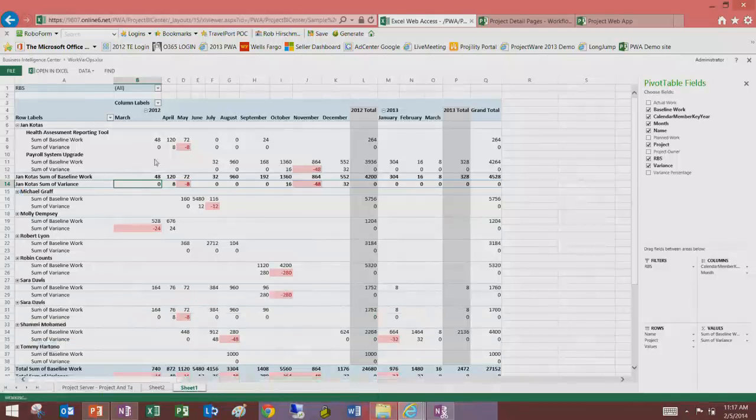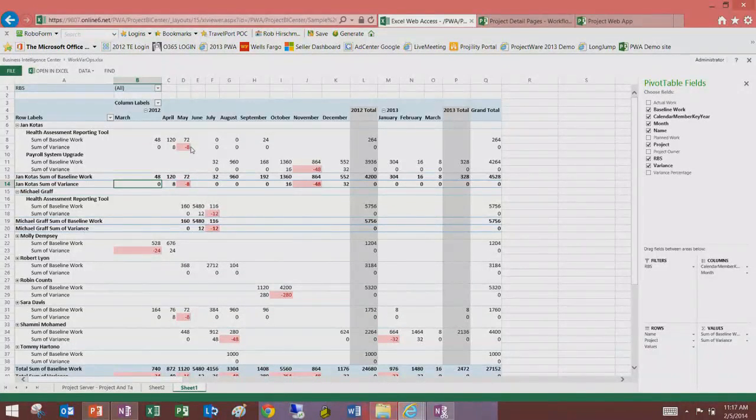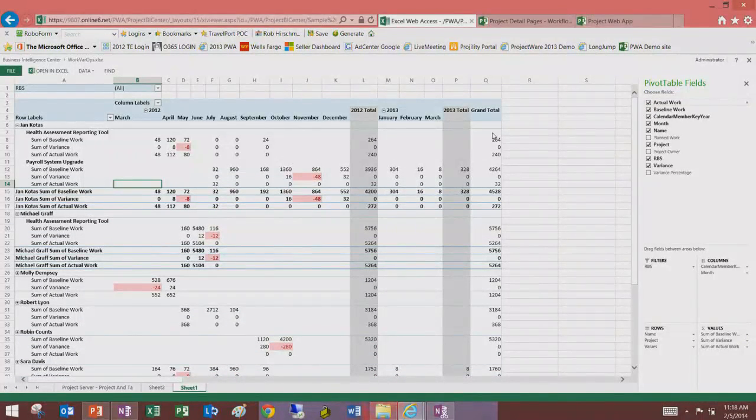And for that, if we start to look at it, we can start to identify where we have very big problems. An 8-hour variance in May, I may not care so much about. But if I look down here, a 48-hour delta in November, that may mean a lot more to me. So I can identify these challenges, and I can use Excel and Excel services reporting to do some cell highlighting and start to identify any problems I have with my resource workload. And the nice thing about that is if you have any other data there, you can start to add it to your reports. So if I'm accessing some of the cubes or the OData behind the scenes with Project Online, I can deploy different kinds of reporting that give my managers visibility that they can very quickly get access to from their desktops. So again, this is a standard Excel services report out of the tool.